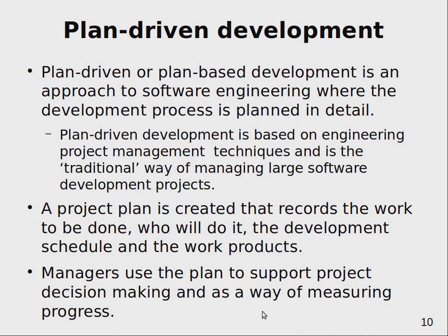An important thing about finalizing tasks is just a reminder that usually you have very big challenges and problems parallelizing tasks at the beginning of the project and also at the end of the project. So you always need to remember that closer to the end of the project, there will be more and more tasks which have to be done in sequence.